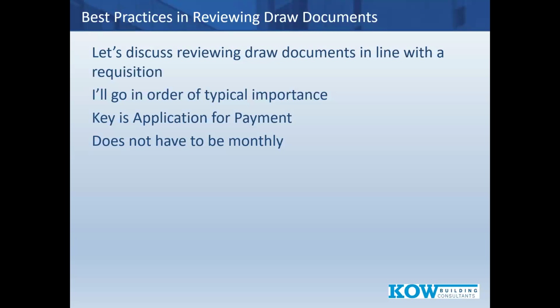So for example, I could walk on site for requisition number 1 and say to the construction super, hey, how do you set up your calendar for your subs? And if they say something like, well, we tell our subs, and a subcontractor in this case would be, say, the plumber, we say to them, hey, Mr. and Ms. Plumber, you need to present to us by the 25th of the month what you've gotten done that month, and we will review it and let you know if we're okay with it.